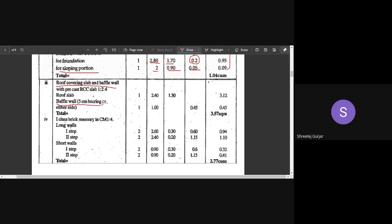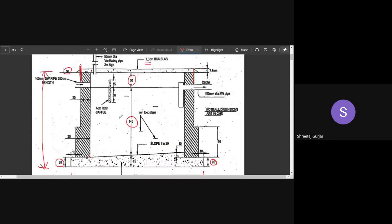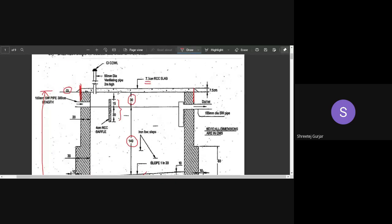For the baffle wall, it is 4 cm thick and its length is the in-to-in distance of 90 cm plus some bearing on each side. Its depth is 30 + 15 = 45 cm. So we now have calculated: excavation, PCC bed, sloping bed, roof slab, and baffle wall.